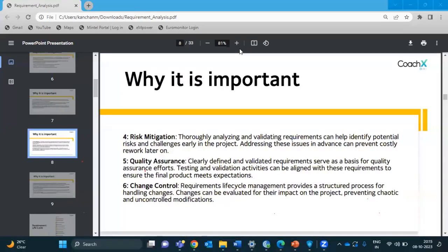So this could be part of change control, which would be a change of the project plan. Or it couldn't be, because if you're using just a very similar technology, just a different set of code or different set of libraries, then it might not be. But if there is a large change or major changes in your plan, then it has to be part of change control. Okay.